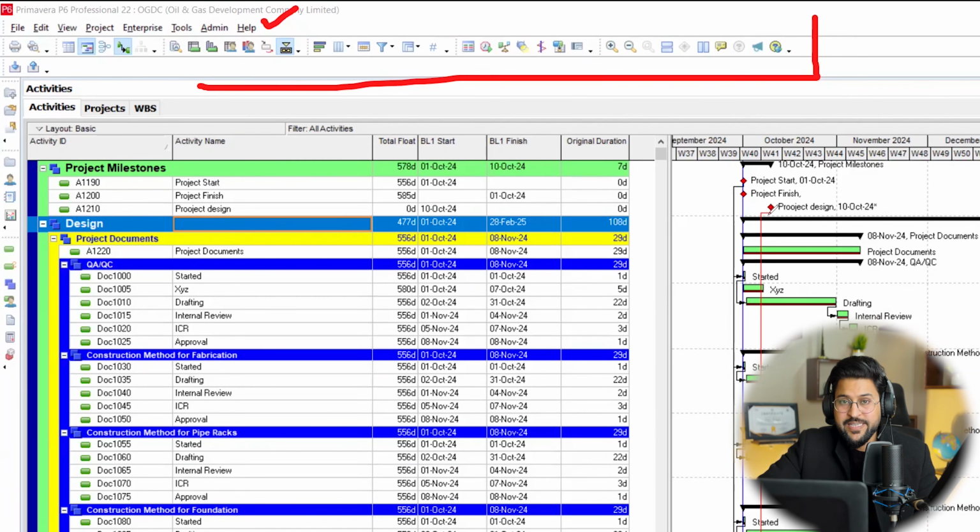Now on this file, I'm going to load my data. First thing, we have to load our WBS. So this is my WBS, but in this WBS, you can identify there are different kinds of WBS level. This is my first level WBS. This is second level, second level. You can see that second and second, and all other gray areas are third level. So you have to understand that hierarchy, that step by step understanding of linkage. So first, shop work and site work under this project.